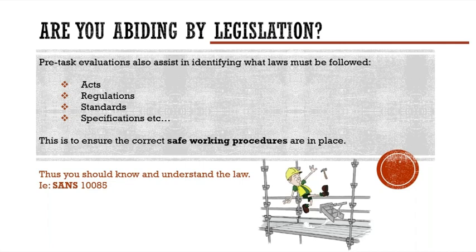So let us just take an example. If we were on site as a plumber and we needed to install a hydro boil and then later on a geyser, later on we were climbing up onto the roof and we were going to be jetting some high jet water in order to clean certain areas, in order to put down JoJo tanks, whatever it is that you were actually performing on site, there were various tasks that you quoted for on that site. Now, the one task, perhaps installing your hydro boil, it would not be necessary to use a scaffold. So you wouldn't really have working at heights. You wouldn't need to have a safety harness. You wouldn't need to have a full protection plan. In fact, you wouldn't even need to get a company to set up and dismantle your scaffold and have an inspector checking it. All of that falling under the SANS 10085 code or standard is not necessary for that task.